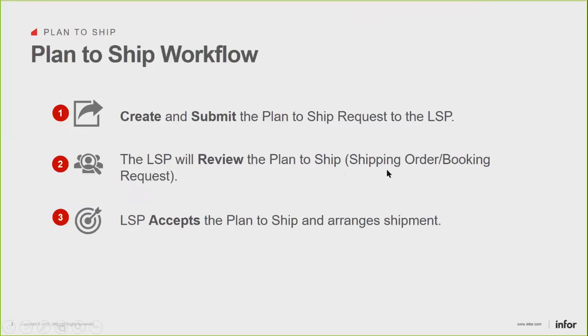Well, actually, a shipping order will be generated once the plan to ship is submitted by the supplier. Okay, and ACS will accept the plan to ship if there are no exceptions, and they're going to arrange the shipment once the booking is confirmed.